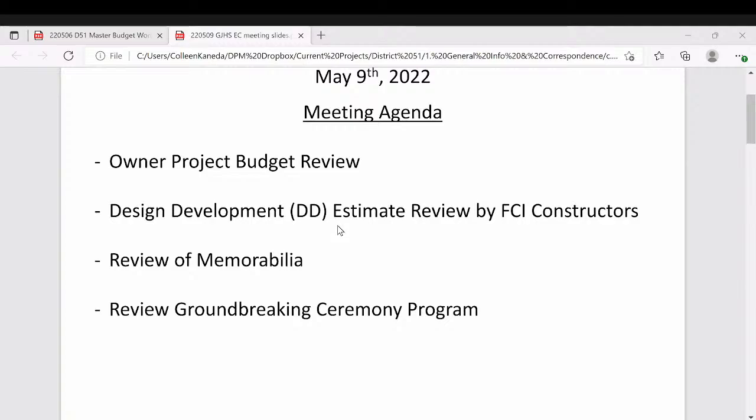I guess what I want to say overall, and I was telling some of the folks who came early, we're working on several K-12 projects right now on the Western Slope and several other projects that aren't K-12, but other public projects. And most of them are trending like 20 to 30% over budget, because in my lifetime, this is the most cost of things have ever escalated. And we didn't know that a year ago when we were budgeting for the project. We thought COVID was going to probably have an impact. We didn't know how much. We of course didn't know about the war in Ukraine, and things that are just gonna have some variables on our supply chain and materials and labor.